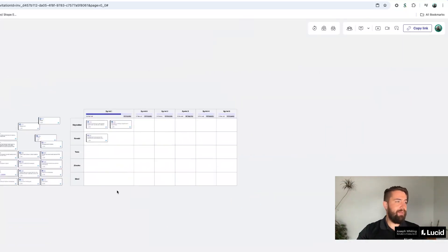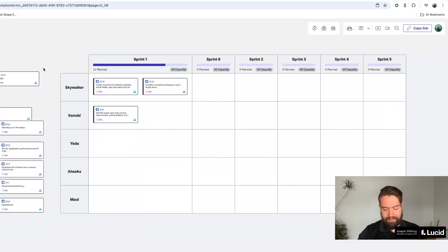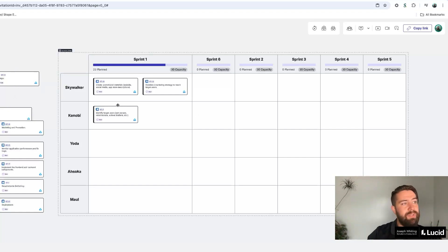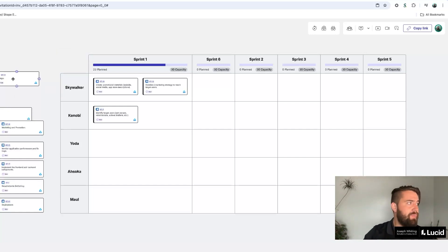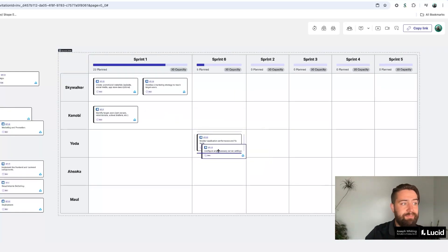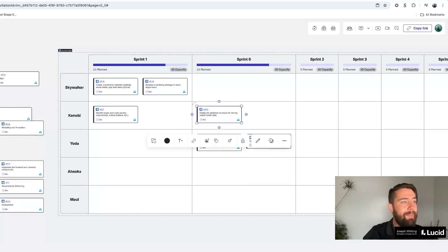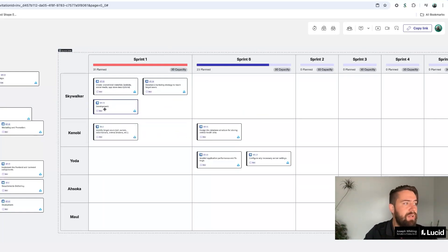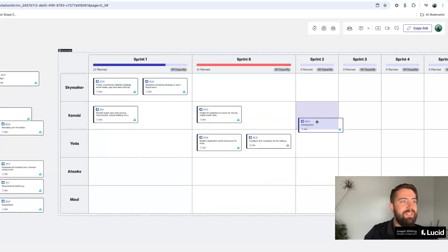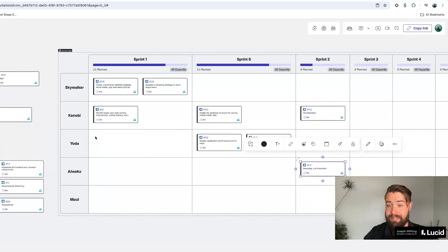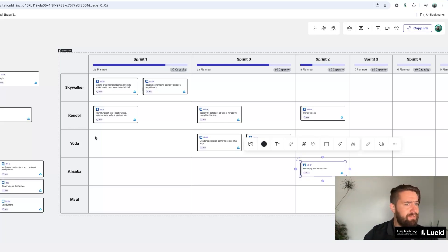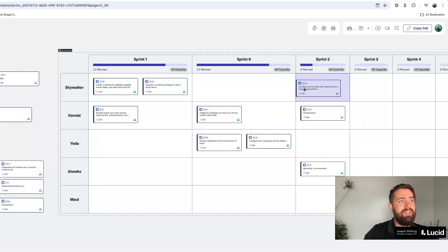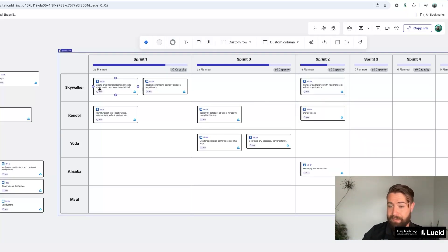Now, similarly, Air Focus works exactly the same. We can map out the work that we're doing via sprints. So I can come in here and as these have the different estimates of work, we can map out, oh, looks like we have too much going on in sprint one. So I can map this out to the various teams to ensure that we're getting to a point where everything is equally balanced and we're able to function from there. This is an example of using capacity planning, which is a new feature within Lucid to help teams as they're doing their sprint planning.